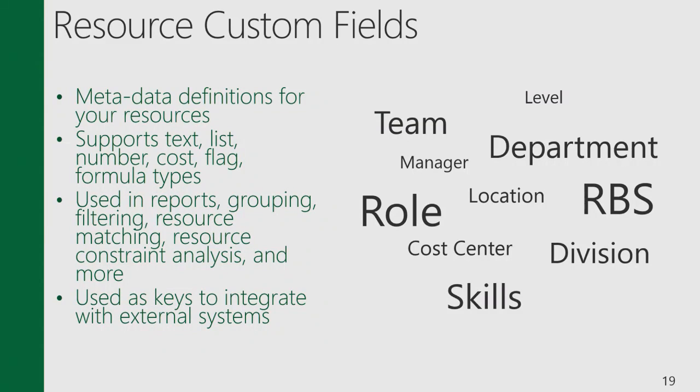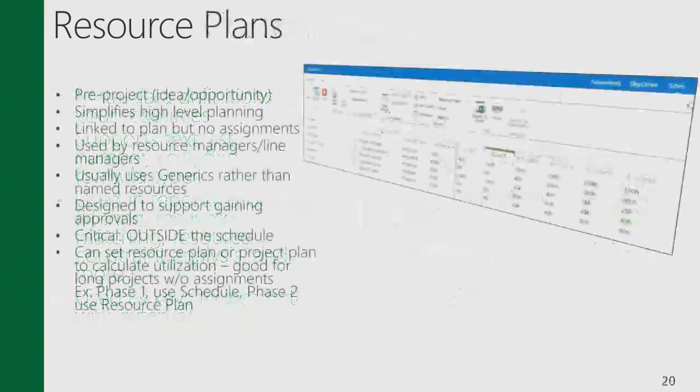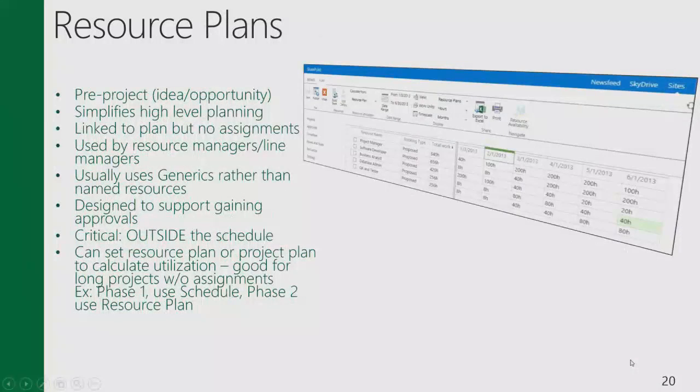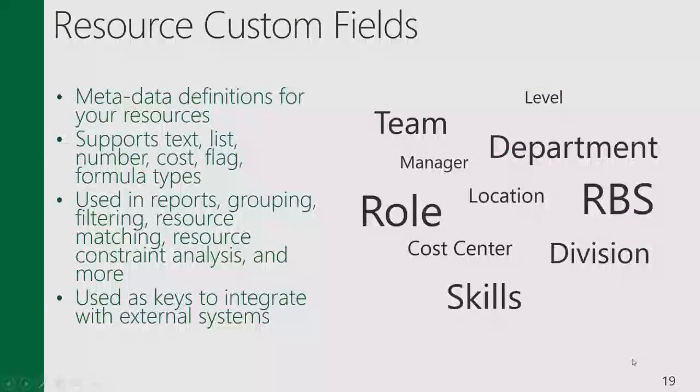Things like what is the visibility of a single project manager out of, let's say you have 1,000 projects in a system and I'm a PM in Department A. If you want to restrict that project manager to see projects in that specific department or resources in that specific department, you would basically use project permission mode and use the dynamic security features of the RBS to restrict the visibility of projects and resources. So this is a very important concept.